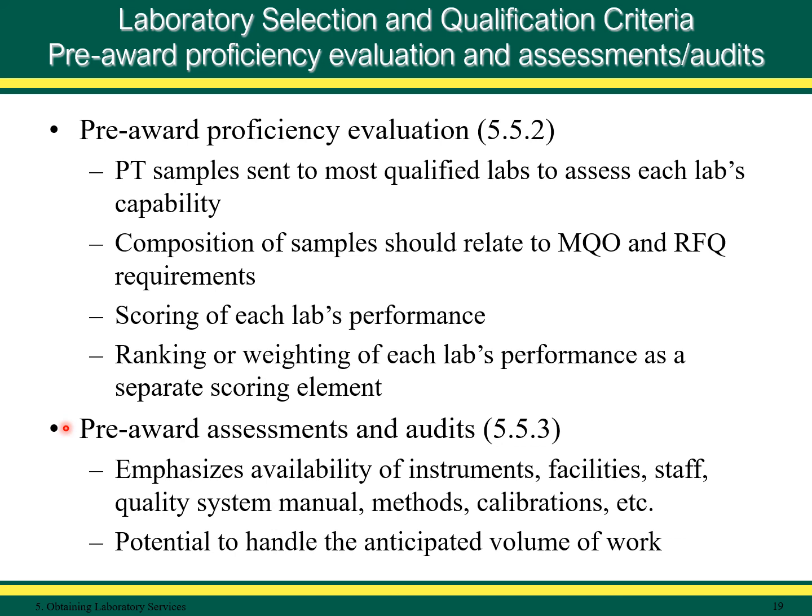A pre-award assessment or audit may be performed to provide assurance that a selected laboratory is capable of fulfilling the contract in accordance with the RFP. The assessment should emphasize the ability of instruments, facilities, staff, quality system manual, methods, calibrations, etc., and the lab's potential to handle the anticipated volume of work.